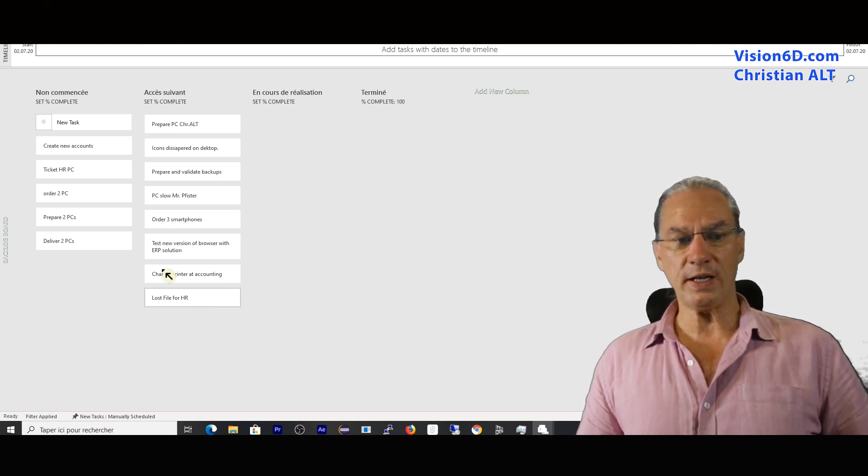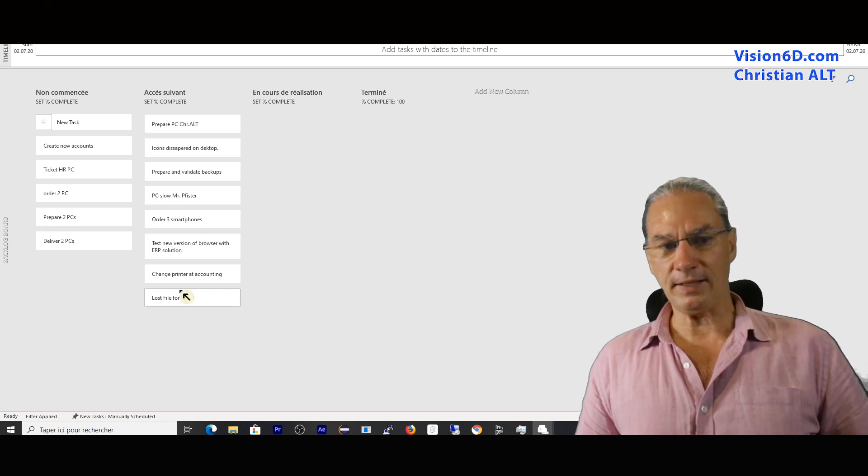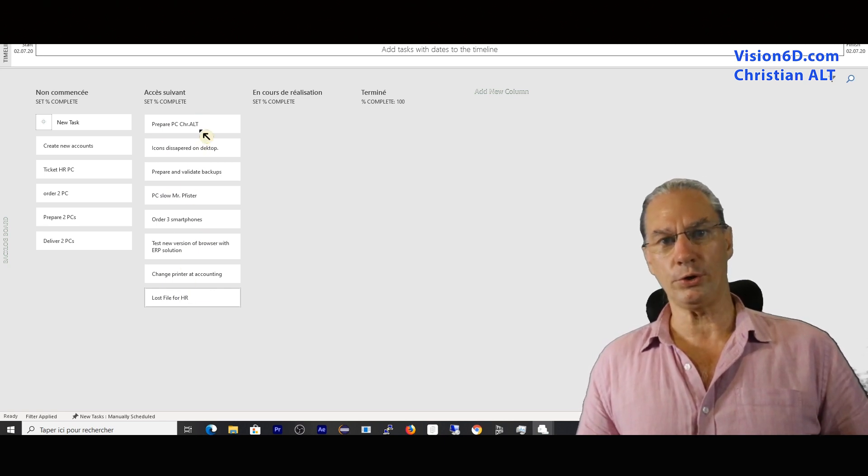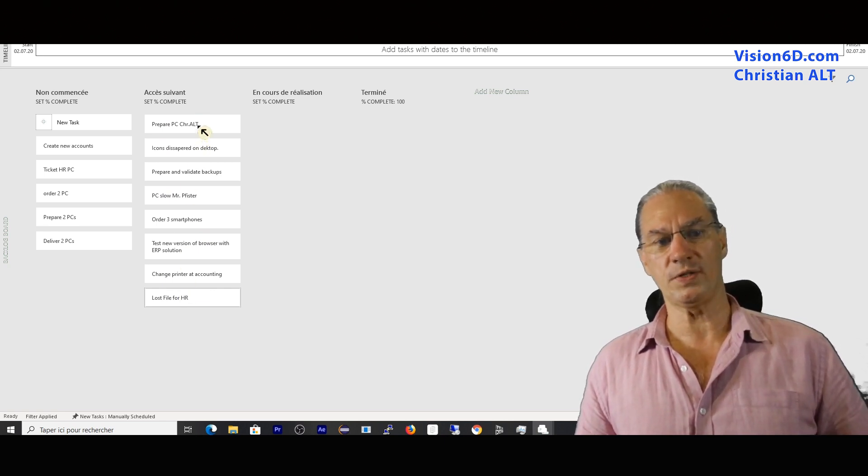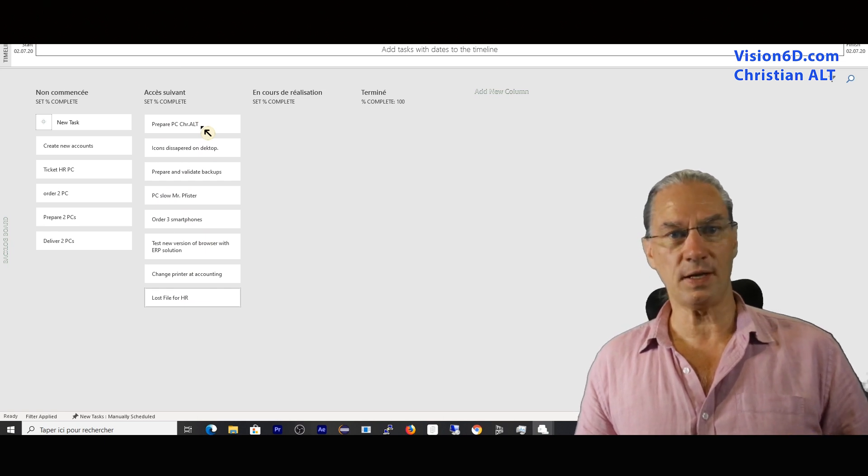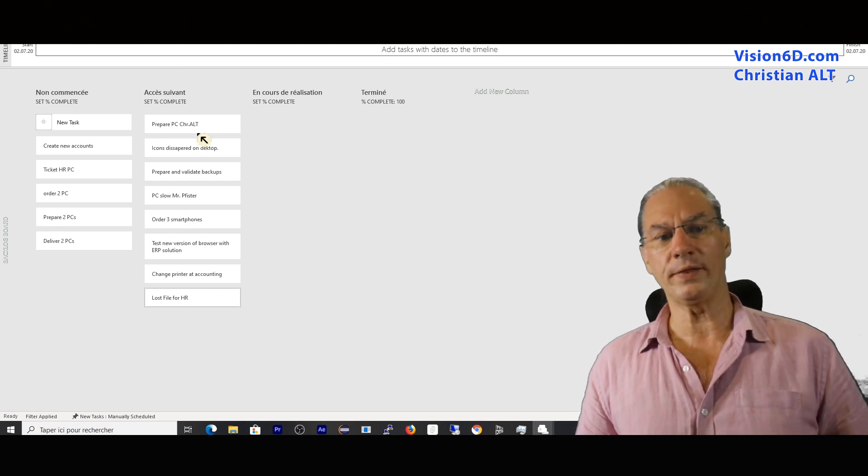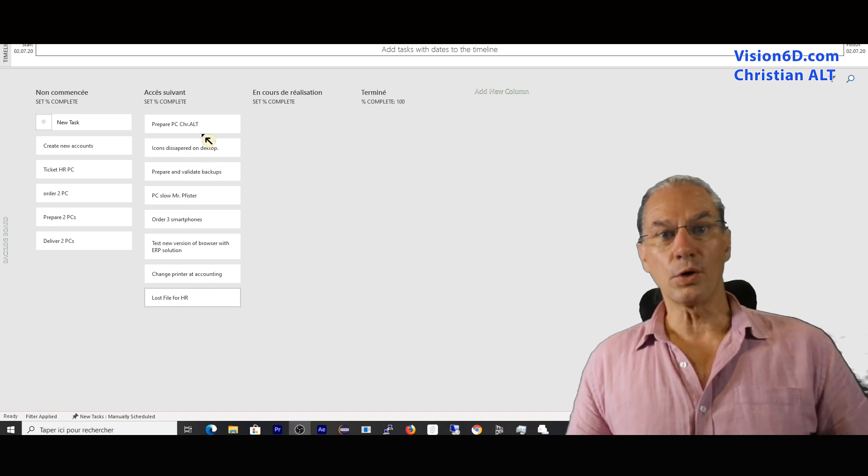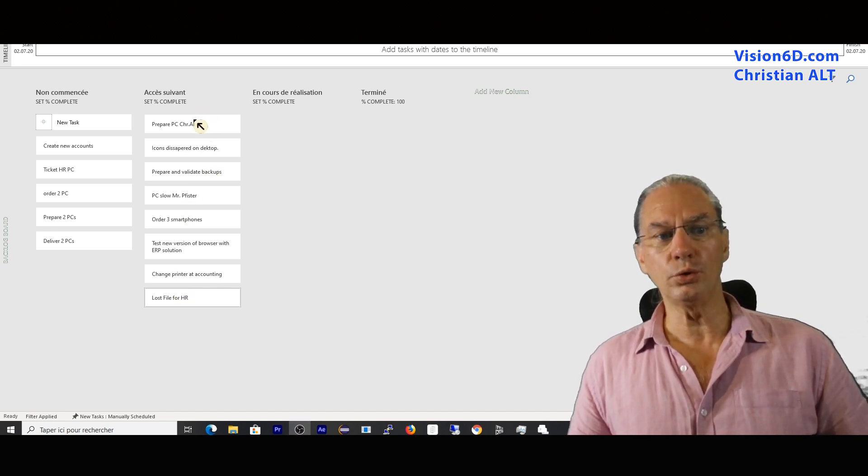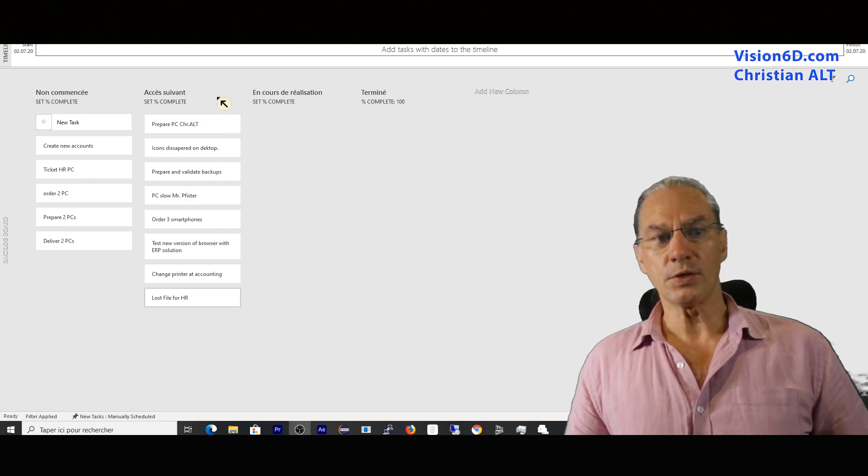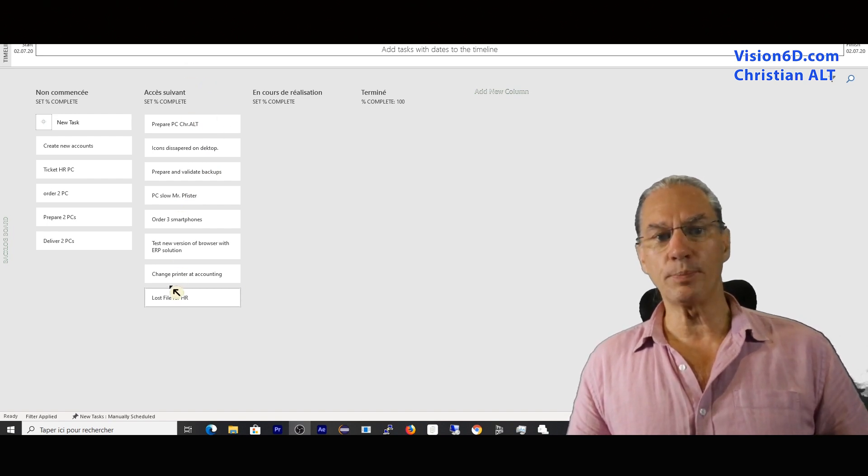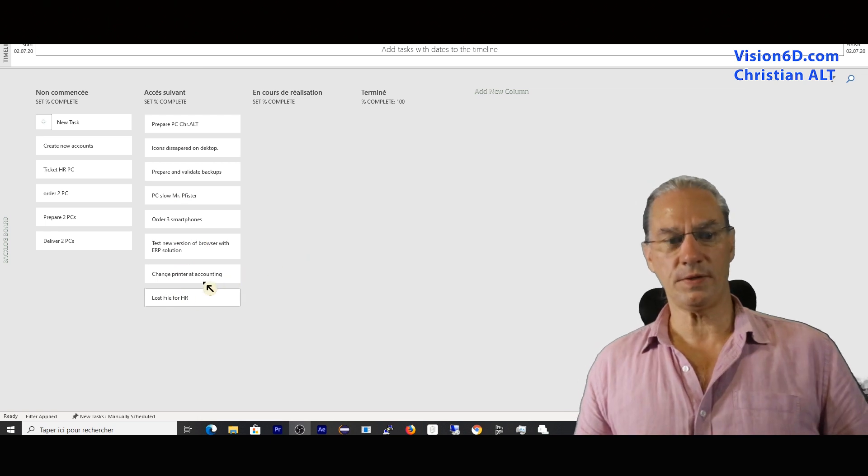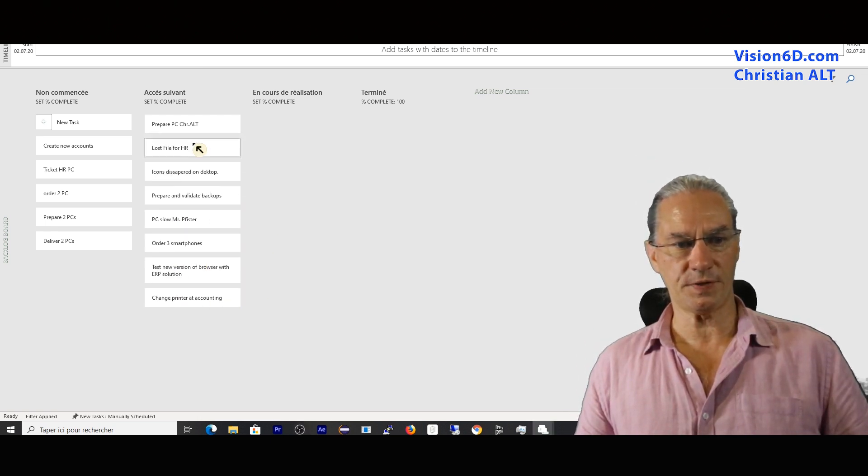This list is set in a priority order. They will take those tickets, or cards, one after the other one. From this point, the team is committed to do those tasks. So it's why we call this point the commitment point. The team has decided to reorder a bit the list here.